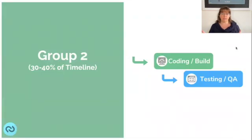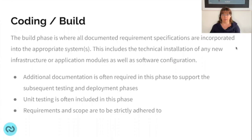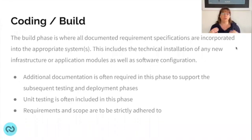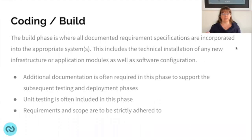Group two typically contains the bulk of activity — around 30 to 40% of the total project — and includes the coding and build phase as well as testing and QA rounds. The build phase follows sign-off of design documents, where specification documents are incorporated into the appropriate system or technical environment. This includes installing new infrastructure, application modules, and all software configuration — essentially anything requiring hands-on keyboard effort. Additional documentation occurs throughout this phase to support subsequent testing and deployment, and some unit testing is also typically included. It's critical to stick to the requirements and scope during this phase.